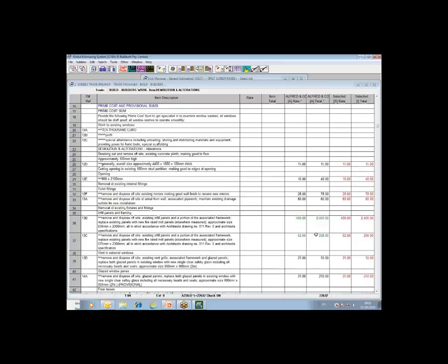And how you do that simply is you bang in a rate, and then on the button bar at the top you'll see there are a number of options here: temporary rate, estimate rate, subcontractor rate, and quoted rate. So I've marked these items as temporary rates, and what I'll do is I'll just mark this one above here, this €60, as a temporary rate. And when I do, it goes green.